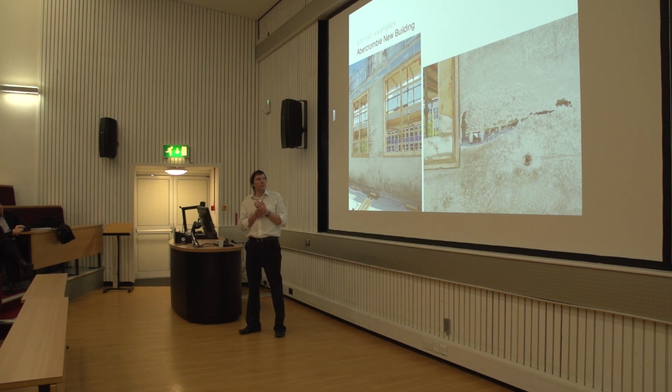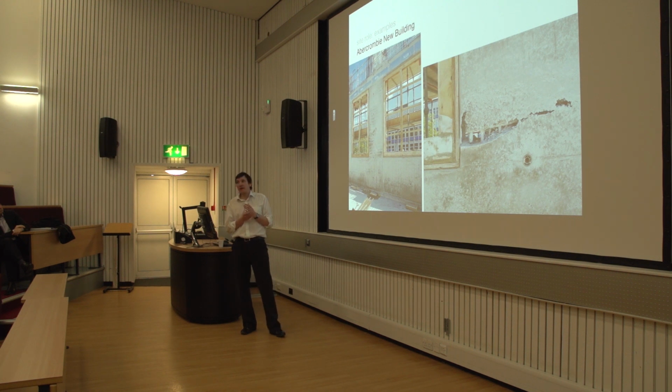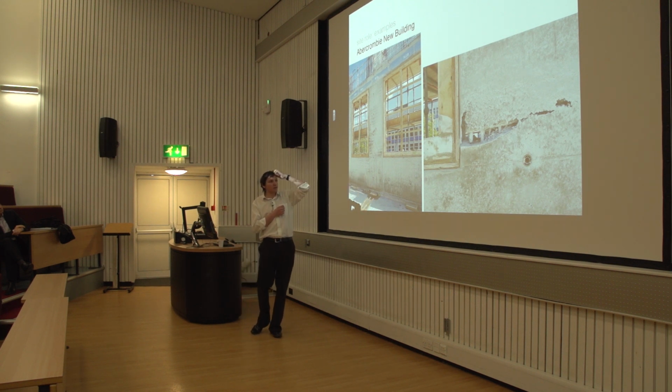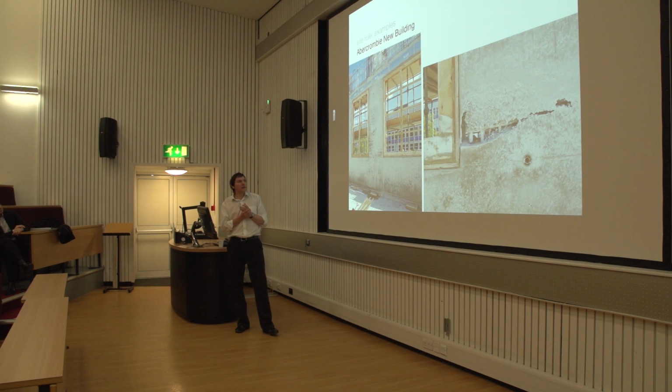And that took them probably 3 or 4 days to put the formwork up and cast it. It probably took them about 2 weeks to take that wall down. It was a big process condemning some of this stuff. So the program implications of taking this down when they're trying to put the next floor on, bridge over, are massive. So even though all of this is aesthetically enhanced concrete, and it's all going to be exposed at the end of the day, we accepted that for these areas they would locally make good.